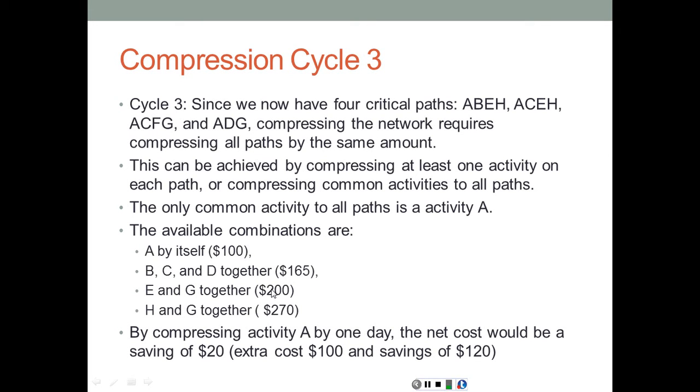Therefore, after compressing activity A, if I try to compress any other activities, that's going to be on the more expensive side, because that's going to end up costing me more money. So I'm not saving any money by reducing the duration, I'm actually spending more money.